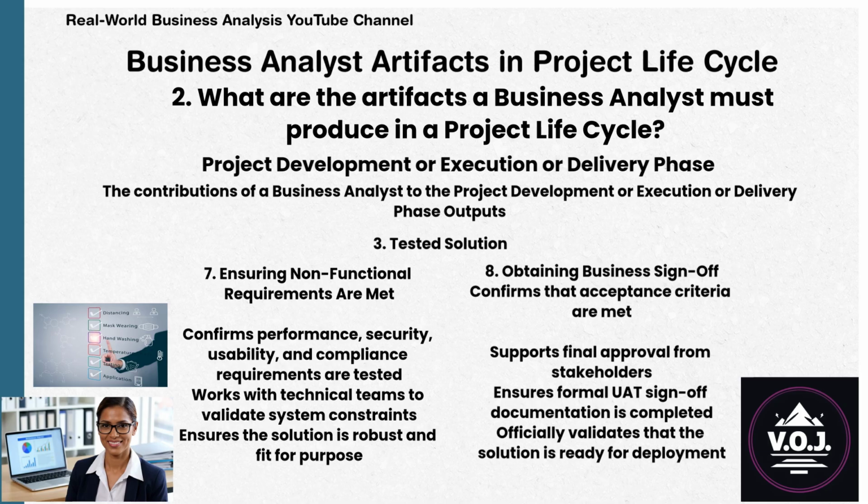8. Obtaining business sign-off. The BA confirms that acceptance criteria are met, supports final approval from stakeholders, ensures formal UAT sign-off documentation is completed, and officially validates that the solution is ready for deployment.